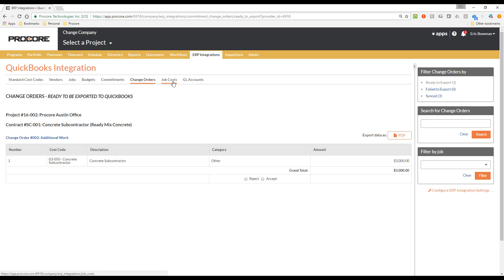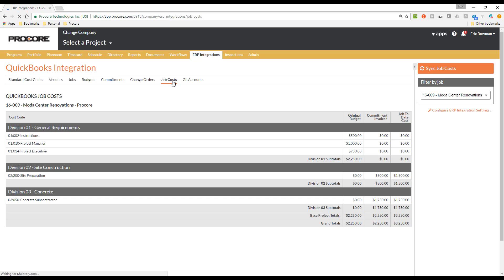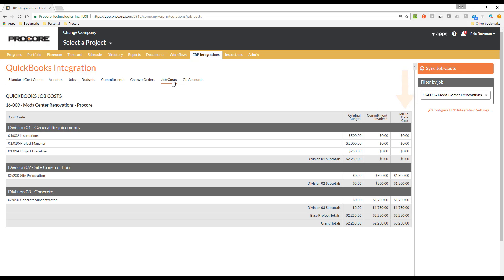The last area under ERP Integrations that I would like to discuss today is the Job Cost sub-tab. On this tab we display a report that pulls budget and cost information from QuickBooks. This is in addition to the columns we discussed earlier in the Budget tool. On the ERP Integrations tab, your Accounting Approvers will be able to review the cost information for any of your integrated projects. For each project, you can see the original budget, commitment amounts invoiced, and job-to-date cost figures.